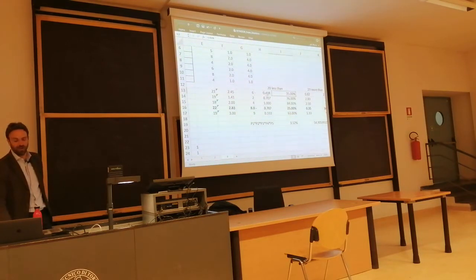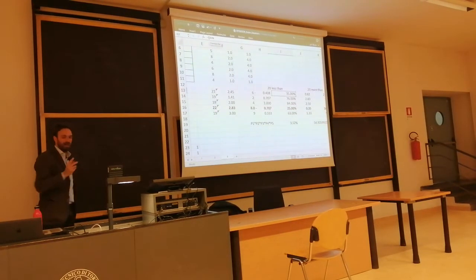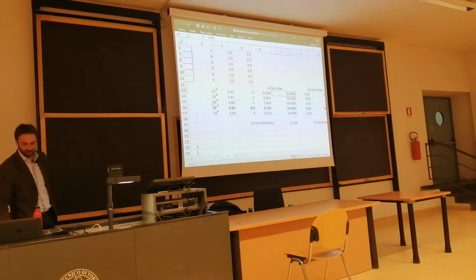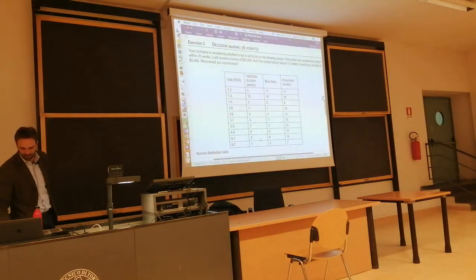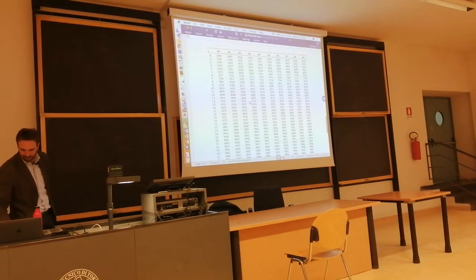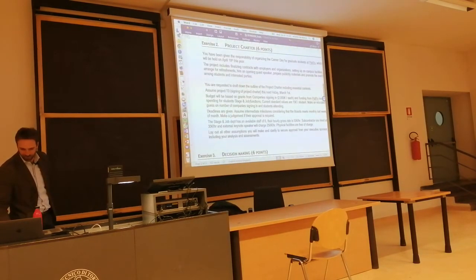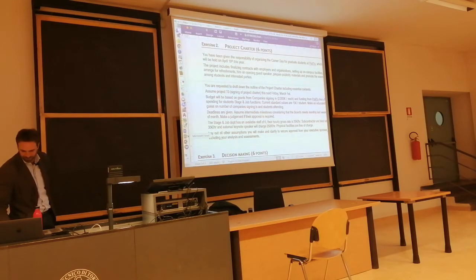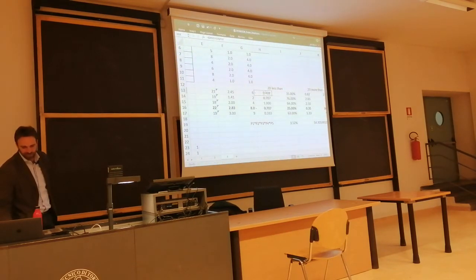And this can be converted into 1 minus 0.4. And 0.4 on the tables, 0.04 on the table, 1.04, sorry, just here. Negative 0.04 equals 1 minus 65%, which equals 35%. Why 65%?